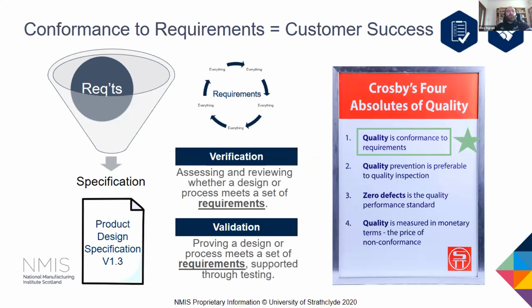So everything revolves around requirements, hence the importance of carefully defining these up front. The specification you've created gives you a checklist which you can utilise throughout the conceptual product development, the detailed design, the design verification, the prototyping and the validation phases. Alistair mentioned you don't have to nail them down straight away, but you do before the design verification, and that's a good point. So you can mature the requirements, but once you start verifying and building and prototyping, then you're going to have problems if you haven't got your requirements specified at that point.